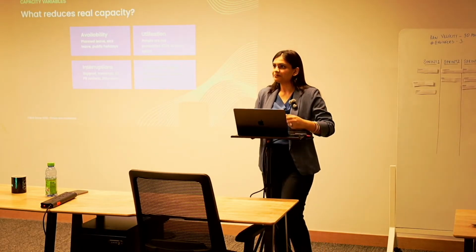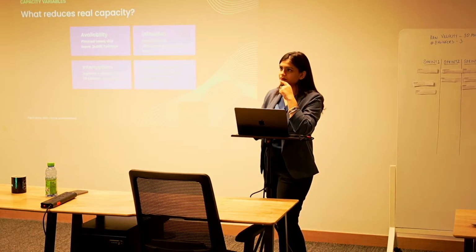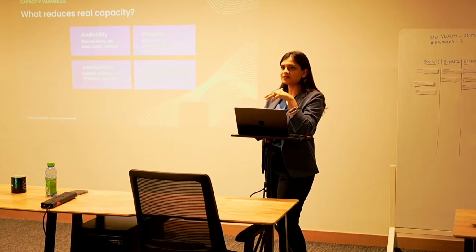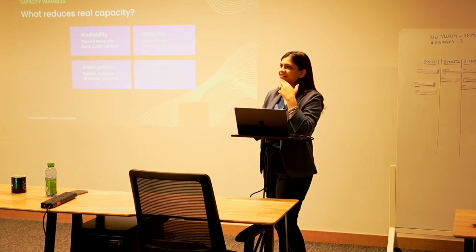I think the ramp down is also as important as that, because towards the end, you are done with the work, right? You don't need that many developers to do the work. Would you want to have all 3 developers till the last date, even if you're just fixing some kind of deployment issue or something like that? No, obviously, right? So I think gradual ramp down is also important.